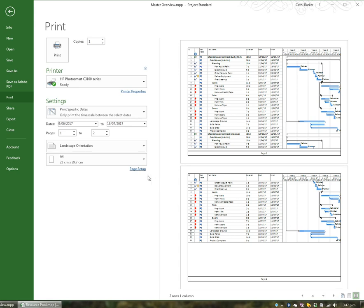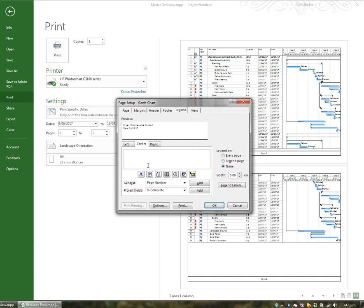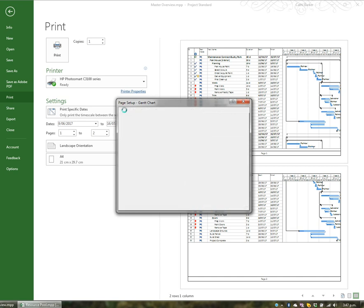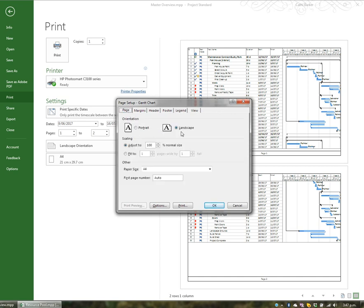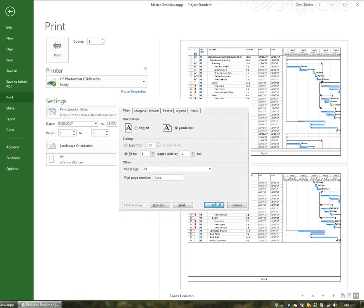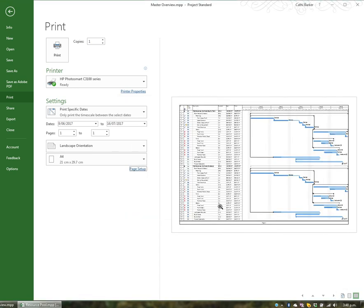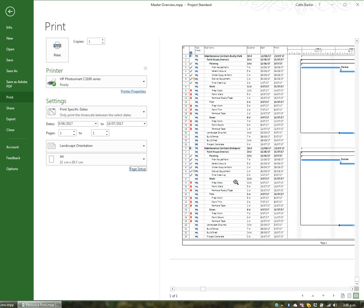In page setup you can not only change the page to landscape or portrait, but you can also scale it. So if I wanted to I could say fit to one page wide and one page tall and click OK. Now it fits exactly on one page, and if I click to zoom in that's how large it will be to read — which is not very clear.